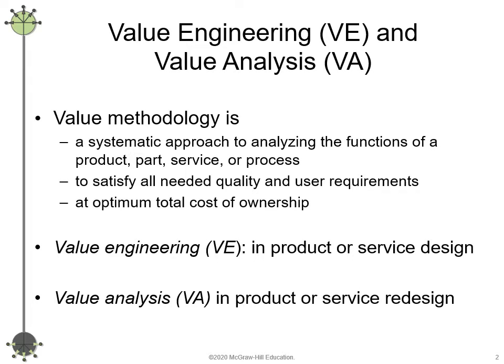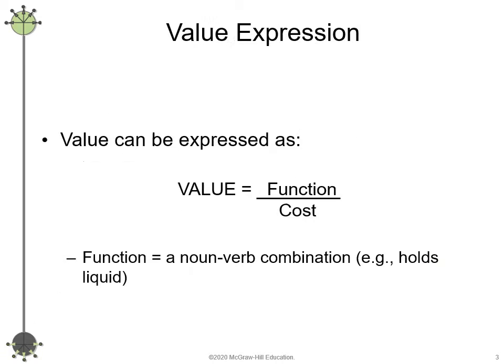So this technique, as you can see, has value engineering and value analysis. When we're talking about value engineering, we are mostly talking about the design of a product or service. When we're talking about value analysis, we are talking about when a product is already designed, so we are mostly in the manufacturing process, and we are thinking about redesigning a product in the next stages.